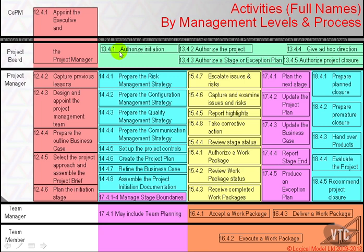Here is an alternative representation of the 40 activities, which is set out against the management levels. Appointment of the executive is carried out by corporate and program management, and appointment of the project manager is carried out by that project board member who is the executive.